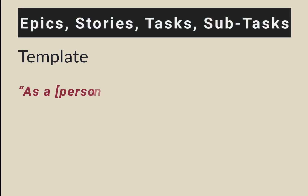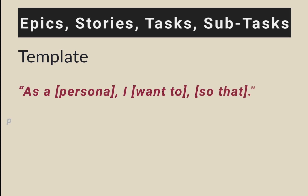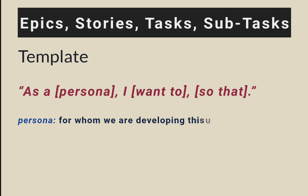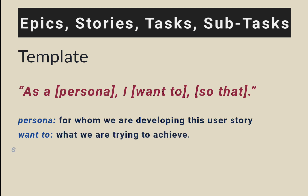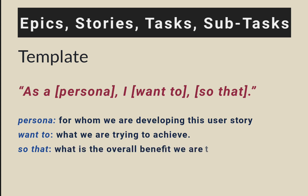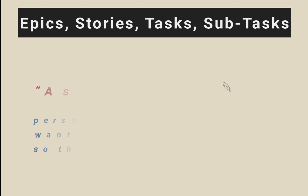So this is the template of the user story: as a [persona], I want to [action], so that [benefit]. Here, persona is for whom we are developing this user story. 'Want to' is what we are trying to achieve. 'So that' means the overall benefit that we will get if we implement this user story. Again, for a better understanding, let's look into an example.